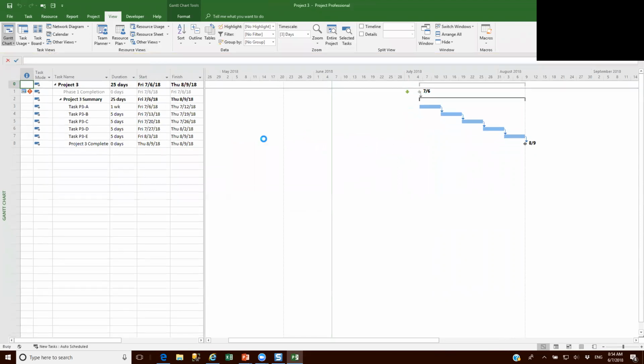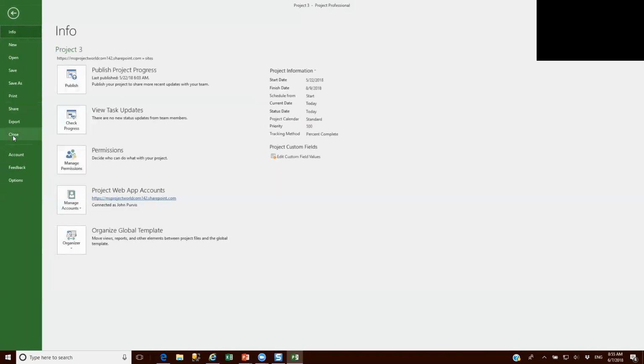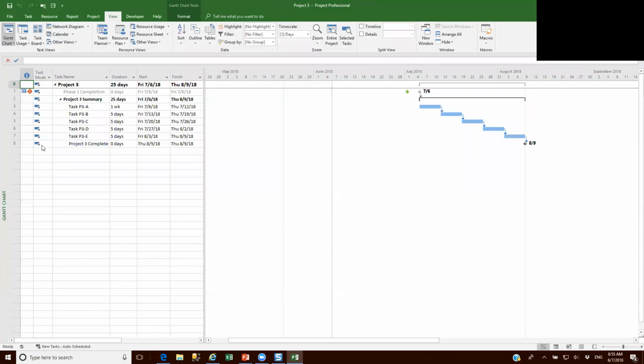Okay? So the impact is automatically fed through the system so that the recipients or the scheduled impacts that are changed off that key milestone change are felt by all other individuals without using a master schedule. You actually got your alert. I can then turn around and file and save and publish this project, and we're going to move from there. So we go File, Close. We're going to save and check it in.